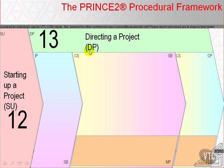For anticipated decisions — i.e. at the end of stages rather than exception situations — the outputs reviewed by the project board include things like end stage reports and eventually the end project report (Appendix A, document templates 8 and 9). The project board also examines new stage plans and revised project plans, both covered by template 16, the business case (template 2), revised risk profiles (template 25), and organisation charts and other factors which have no template.